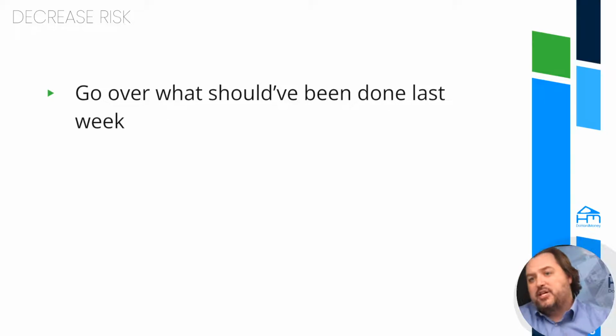And one pro tip on that, don't buy stuff that is out of stock. Buy stuff that is in stock. If it's out of stock, you are setting yourself up for a disaster because one of the most expensive things is your interest expense. It adds up and it really adds up. And if that interest expense adds up, you would much rather take a different tile or a different carpet that's actually in stock as long as it looks good in those things.